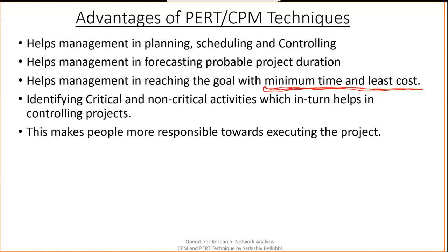It also helps in identifying the critical and non-critical activities, which in turn helps in controlling the project. Critical and non-critical activities you will come to know about while solving the problems on CPM. A critical activity is nothing but the activity which cannot be delayed. If it is delayed, then the whole project will be delayed. A non-critical activity means even if you delay it by 1 day or 2 days, there is no problem with the project duration.